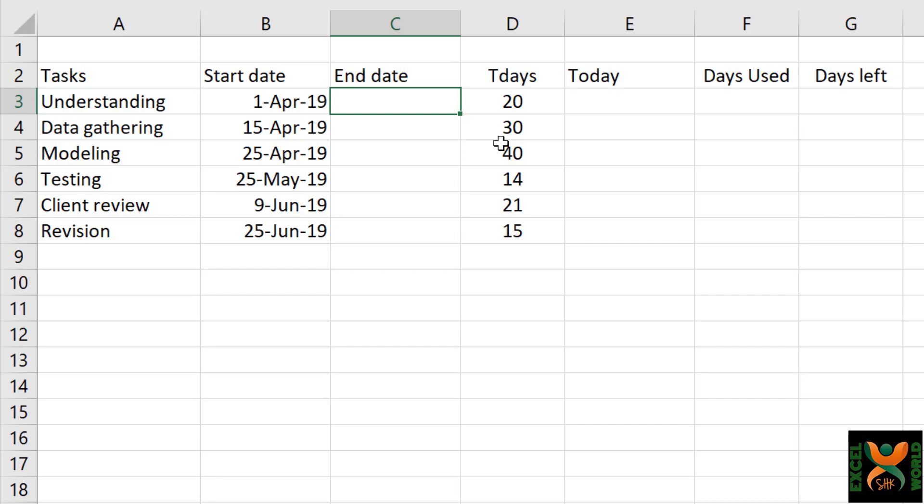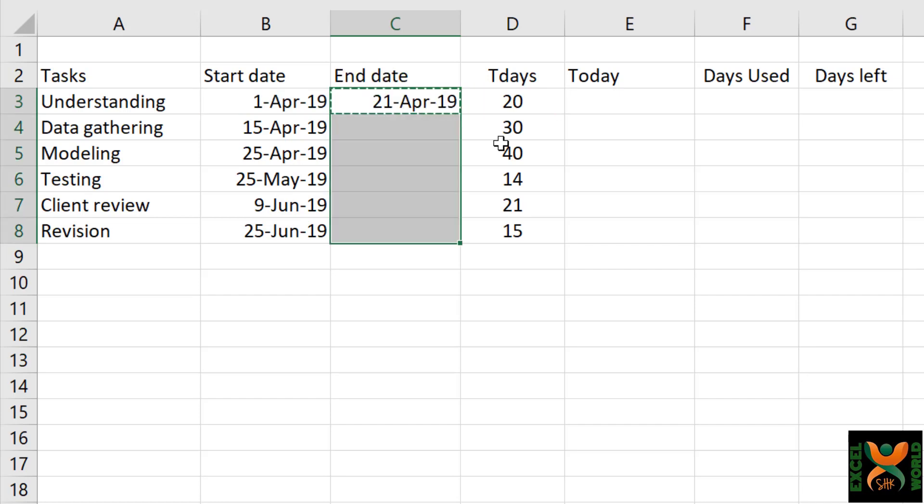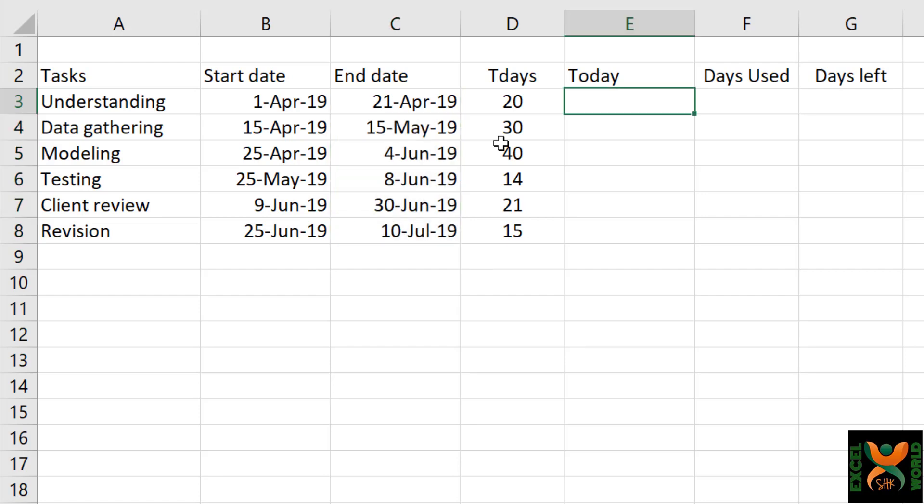As a first step, we will have to calculate the end date because we have the start date and the duration. So, equal to the start date plus the total number of days required to complete the assignment. Just copy this, and with the help of Shift and Down Arrow key and Control D, we will copy this to all of the rows below. So we have the end date.